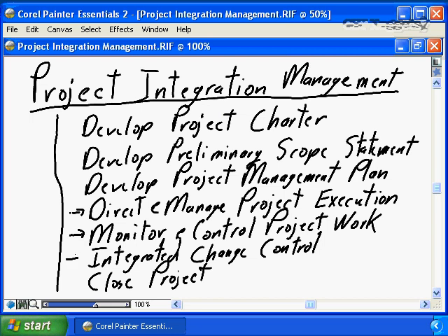Project management is all about integrated change control to ensure that all changes are properly documented and that all changes are fully implemented, fully integrated into the total project picture. And then finally, project management is all about closing the project to ensure that we've archived the project, that we've gained final approval and final acceptance, we've closed out all of our third-party procurement processes, we've archived our records, and we've harvested our lessons learned.